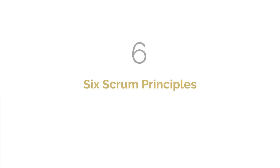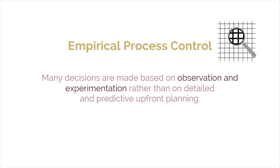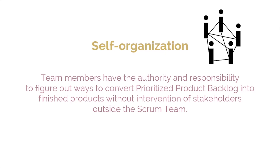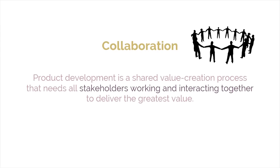The six Scrum principles include the following. Empirical process control, in which many decisions are made based on observation and experimentation, rather than on detailed and predictive upfront planning. Self-organization, which implies that team members have the authority and responsibility to figure out ways to convert the prioritized product backlog into finished products without the intervention of stakeholders outside of the Scrum team. Collaboration, in which product development is a shared value creation process that needs all stakeholders working and interacting together to deliver the greatest value.